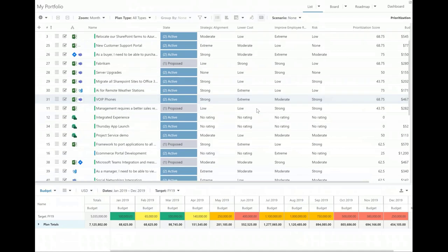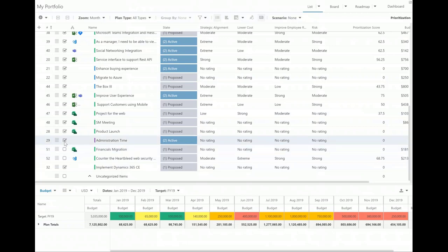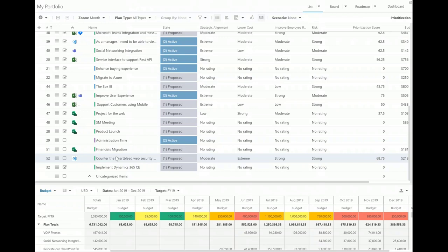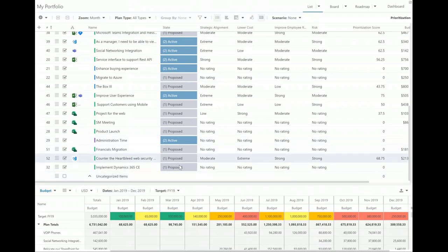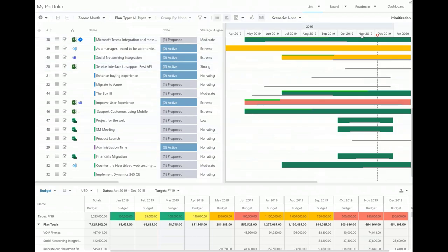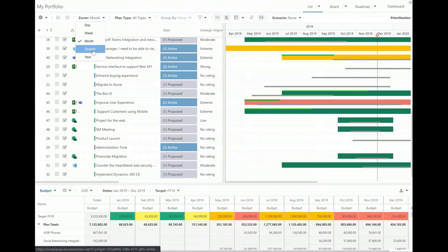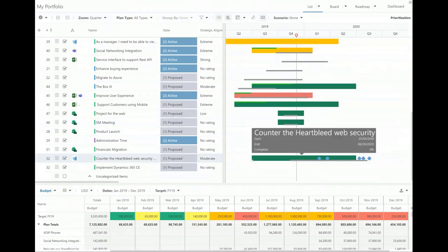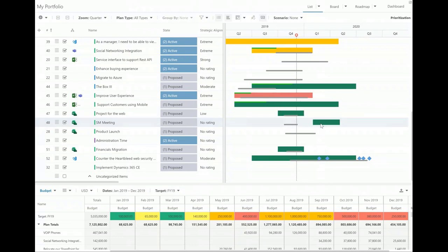The first thing I can do is come down to the lower-priority items and simply start to uncheck them — meaning what if we don't do this, or put it on hold if it was already an active project. That reloads the grid and updates accordingly, and as I continue to check off more, more items go green and we start to resolve budget issues because we're simply doing fewer things. If that's not an option — it's not a matter of doing it or not, just a matter of when — I can open up my Gantt timeline view, zoom out to show by quarter, and move some lower-priority items out one or two quarters, staggering them so we're not doing all of them at the same time.